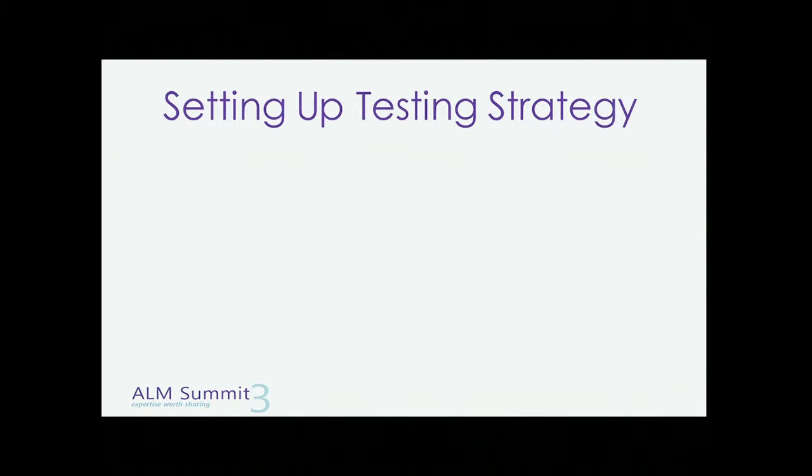So what was our testing strategy? We tried to make it very simple but very clear, which was being proactive. According to the University of Wisconsin-Madison, if you try to fix a bug at the end of the testing phase or at the beginning of the production life cycle, you will pay 4 times more than for catching this bug during development.